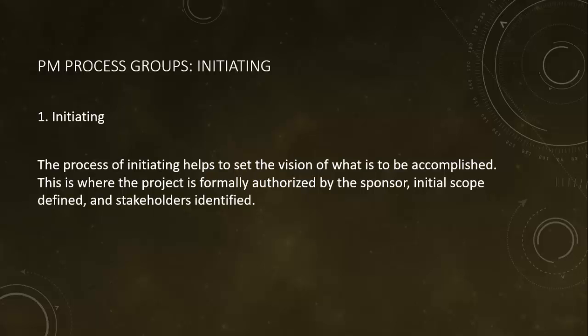It's also critical to define the things that we won't do. So for example, in starting a business, I'm not probably going to immediately look for acquisition targets, right? I'm not going to look for other businesses that I can buy when starting this business. I'm not going to look immediately into moving into new markets. And the reason that that is just as important as defining what you will do is because projects tend to have something called scope creep, meaning that these are the things that we agreed to.